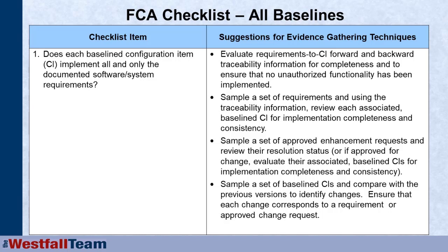If we find any changes in those configuration items, be it a requirement spec, a design spec, an architecture, piece of code, user document, whatever, if there's any changes that we cannot trace back to approved change requests or new requirements, then there is a non-conformance or non-compliance.